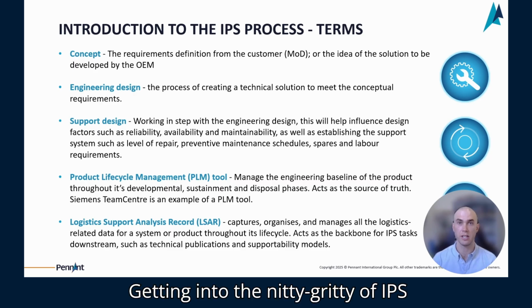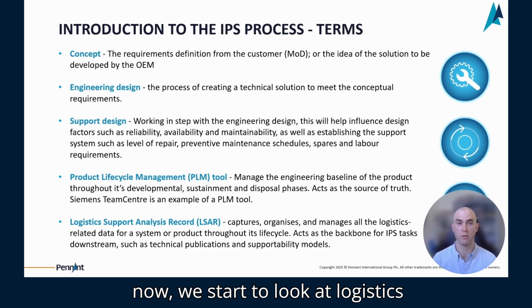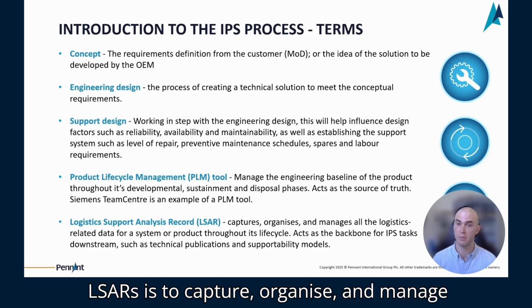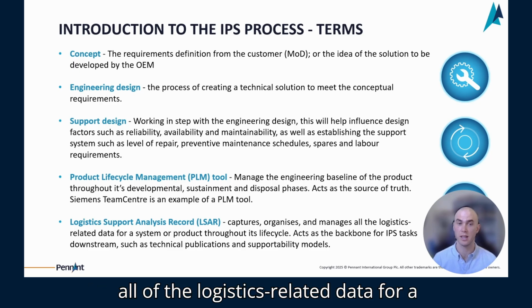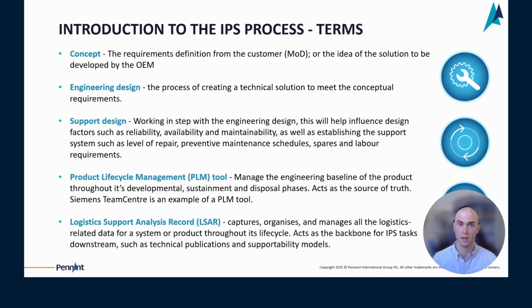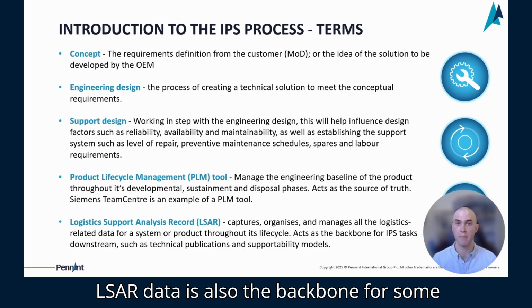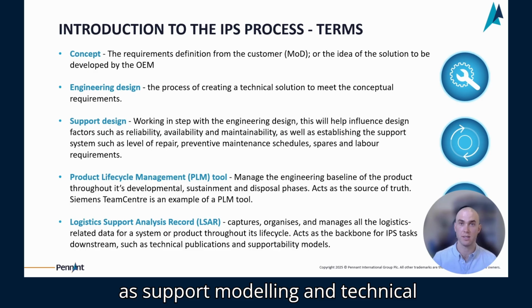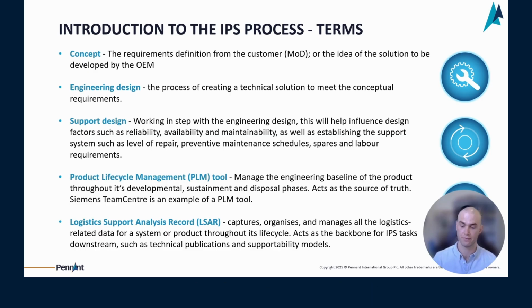Getting into the nitty-gritty of IPS now, we start to look at logistics support analysis records, or LSARs. The purpose of LSARs is to capture, organise and manage all of the logistics related data for a system throughout its life cycle. LSAR data is also the backbone for some of the tasks that come downstream, such as support modelling and technical publications development.